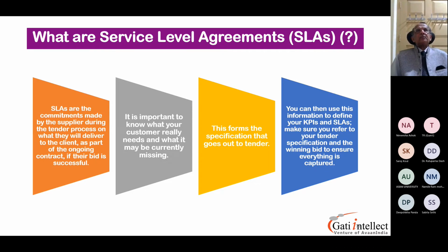And in addition, he may give other details, like warranties, payment terms, what the cost is, the freight cost, the insurance cost, so that you can determine the landed cost. So wherever you don't have the details, you are free to ask during the tender evaluation time. Prior to that itself, you can ask for more details, like service level agreements.